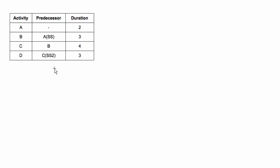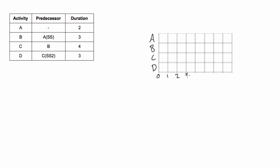So first of all let's draw our Gantt chart. Now let's draw in our activities, the bars for each activity. We'll start with activity A because it has no predecessor, it's at the beginning of the project and has a duration of two days. So we'll start at the very beginning of the project and go one, two days. That's our bar on our Gantt chart for activity A.